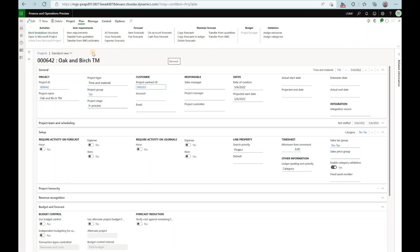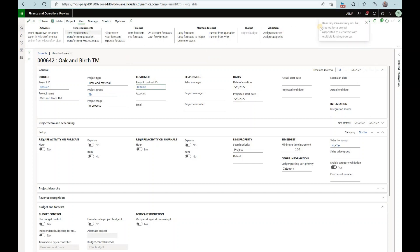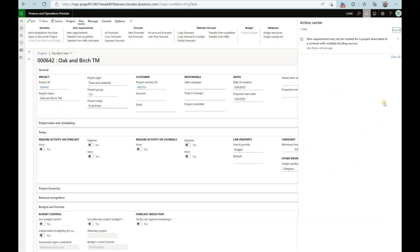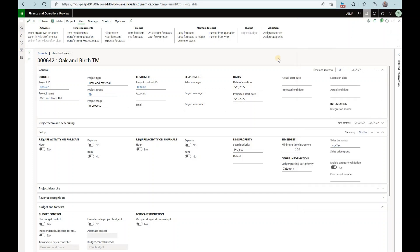For the time and material projects you usually can create an item requirement but only if there is a single funding source based on the project contract and as you have seen we have two. So if we click on the item requirement right here we will see this message that says that item requirement may not be created for a project associated with a contract with multiple funding sources. So this is where we are before activating that feature.